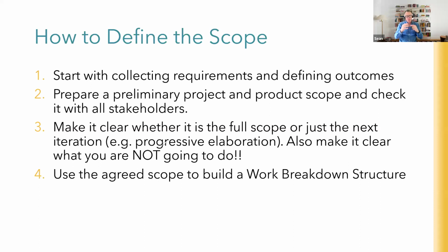But two of the contractors gave me a price that included what they would do. They would supply the heating unit, they would take care of the installation, and there was their price. The third one actually said the following. They said, we will supply this particular heating unit, and I'd asked for a particular model and make. So they were all providing the same heating and cooling unit. But they took the time to say what they wouldn't do. So they said things like, on the day of the inspection, we couldn't see inside the roof cavity.